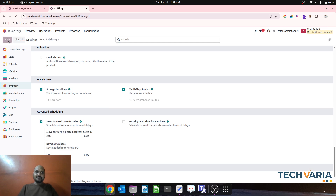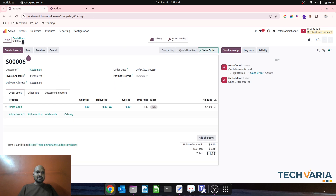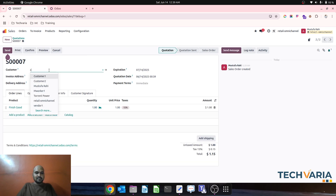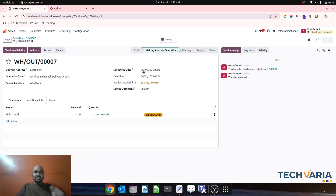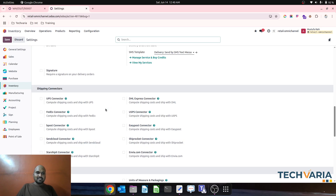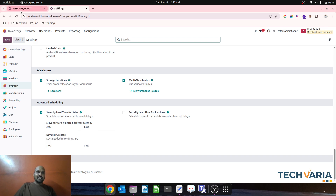Now let's say I update the security lead time for sales to two days. Duplicating this order for the same item — total lead time is again 12 days — but as soon as I confirm, the delivery schedule date shifts two days earlier as a security buffer. So the final delivery date is the 26th but the scheduled alert is created for the 24th.